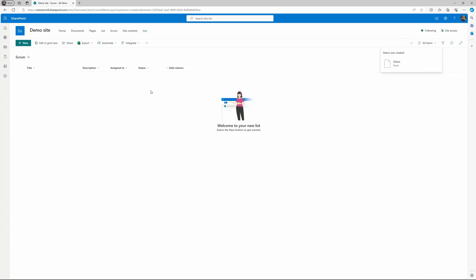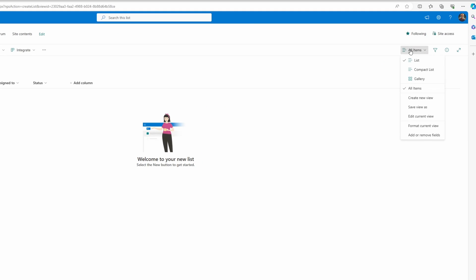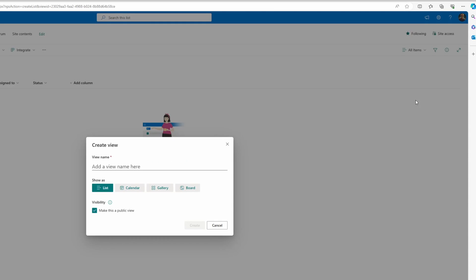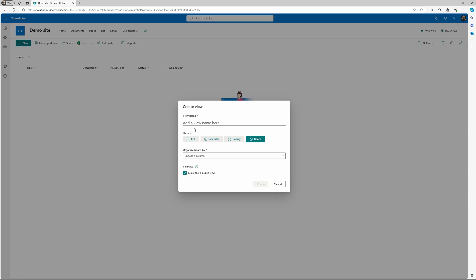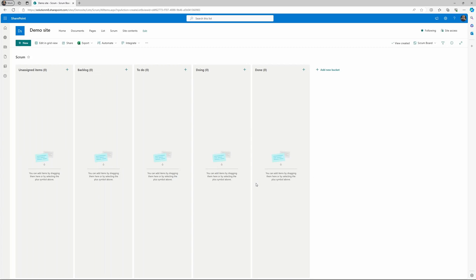The next step is to actually create the board view, so go to all items, create new view, choose the board. Now we'll name this one scrum board, and when you have to choose the organize board by, you have to choose the status. Here as you can see, now we have the scrum board with the different lanes.